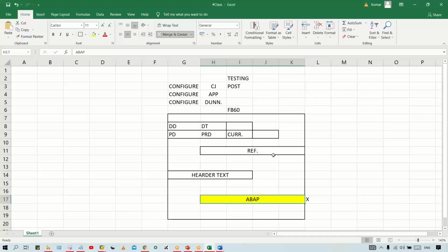So whatever requirement we have received, guys, first of all you have to prepare a document, right? First of all, in which screen the changes are going to happen, right? The next one is where the additional field is going to be added. What is the length of this field? 30 characters, 40 characters, 50 characters, right? And if the client is going to give any input here, then what is the expectation of the client, right? Whatever input they are going to enter here, they'll have some expectation that once we see the report, these details are supposed to appear, right?